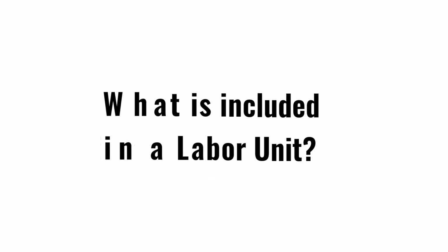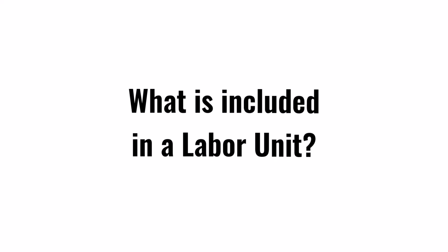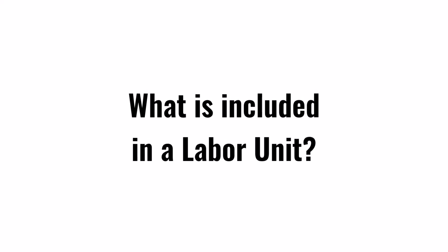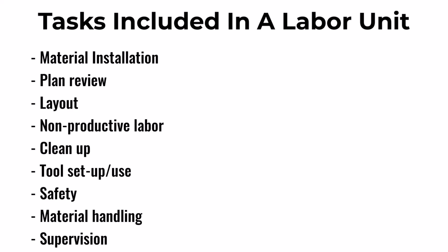So, what is included in a unit of labor? Does it just cover the time to install material? There's plenty of discussion of this on the web. I'll give you my opinion below, but based on a search of the web, here's a list of tasks I've found associated with labor units. Material installation, plan review, layout, non-productive labor, cleanup, tool setup and use, safety, material handling, and supervision.